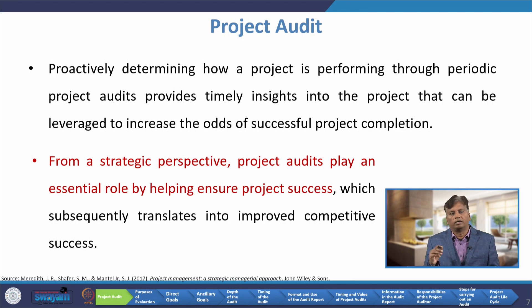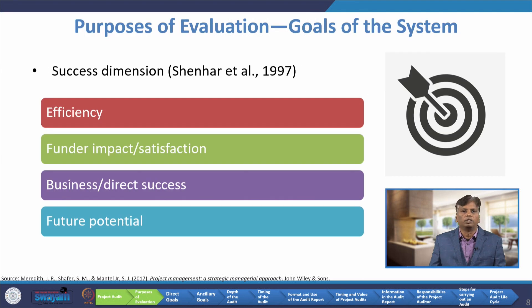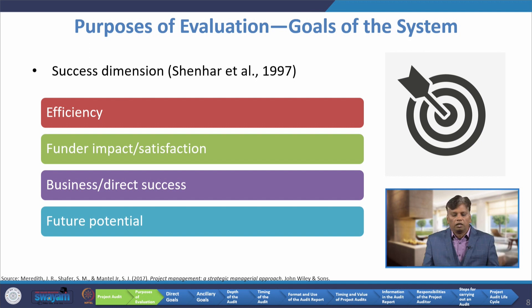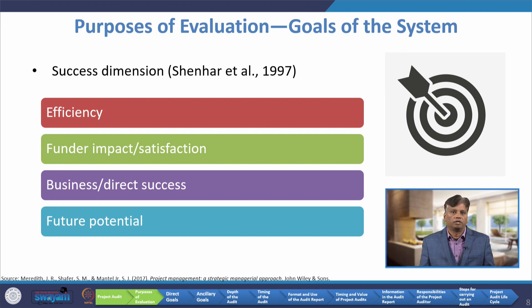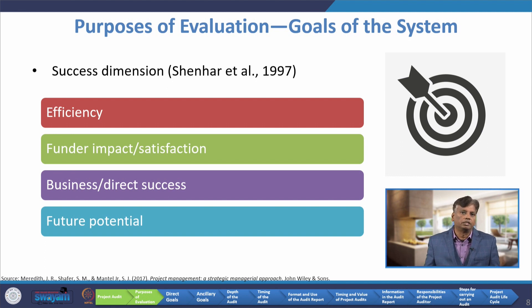Whenever we do the project audit, that indirectly helps to achieve our project competitiveness and success. Now we will discuss about the purpose of evaluation and goals of the system. Shenhar has explained four dimensions for success of any project: the first dimension is efficiency, the second is funder impact and satisfaction, the third dimension is business direct success, and then future potential.